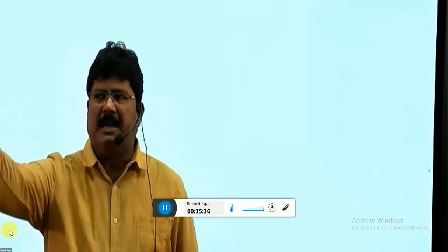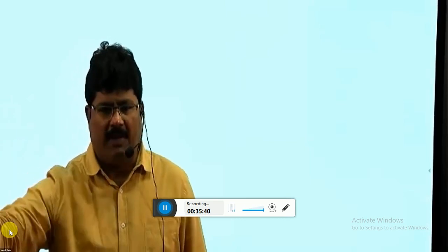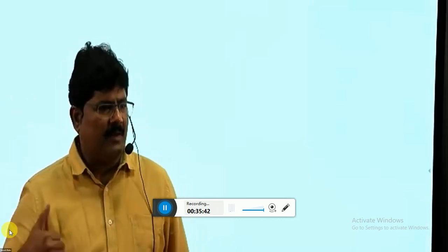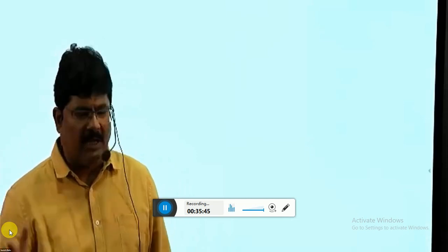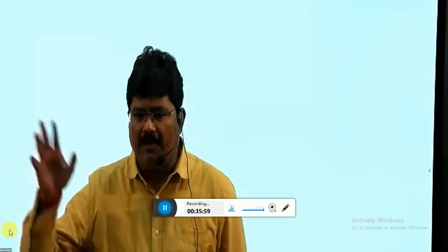This feedback I'll explain to my development company people: these are the 2-3 problems we are facing. Once they rectify it, we go for live production. Next week, directly we start using the application for day-to-day operation. This kind of test approach is called user acceptance testing. The purpose of doing user acceptance testing is not finding the bugs, but to build my confidence that the application is ready to go live or not.